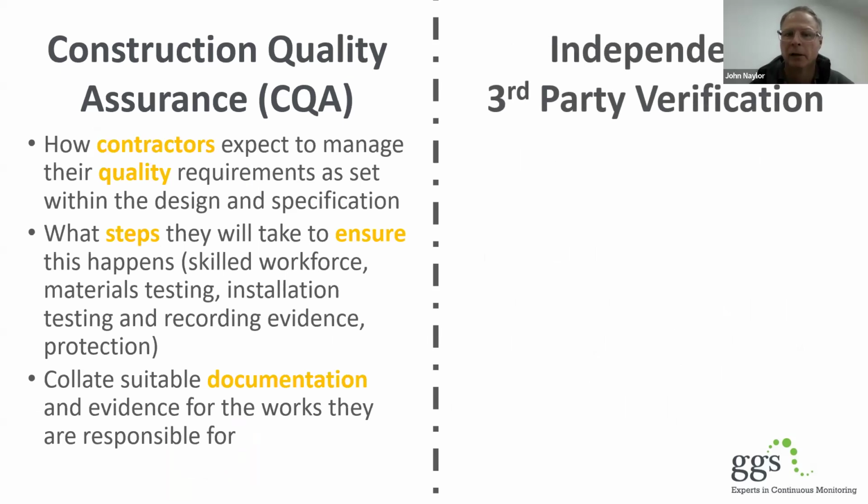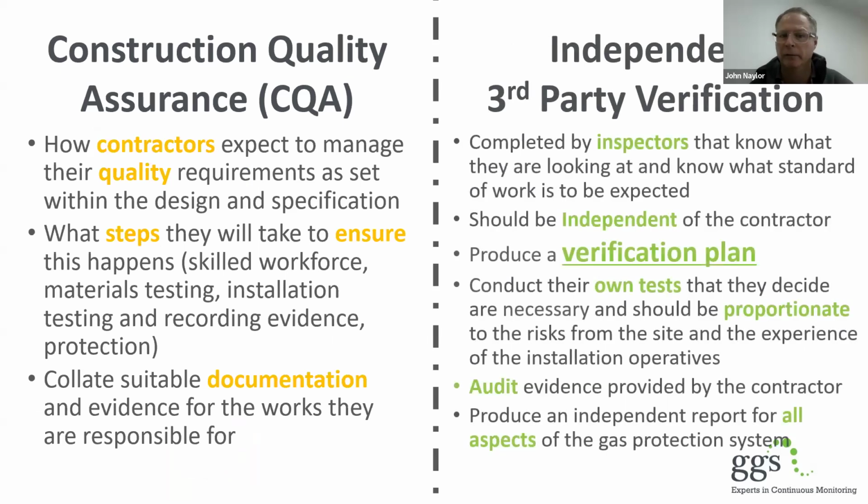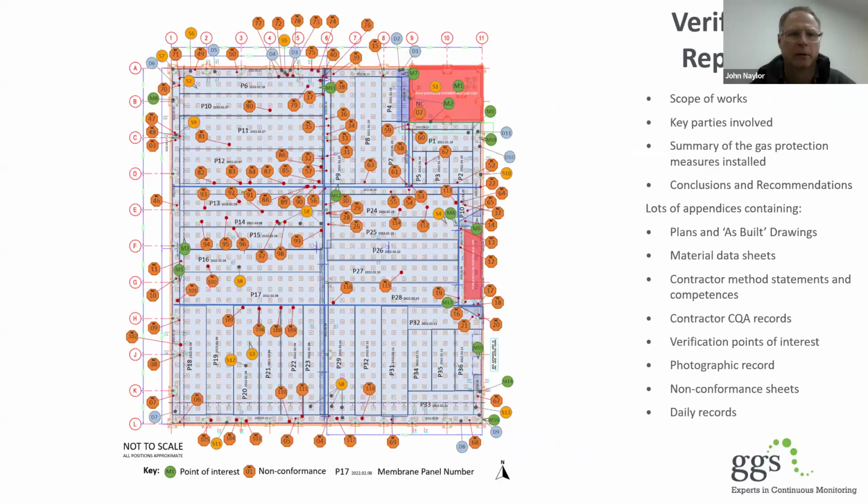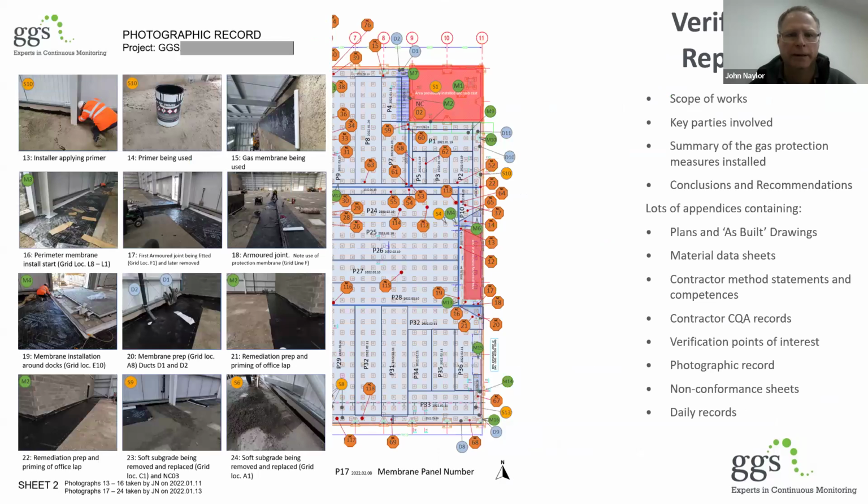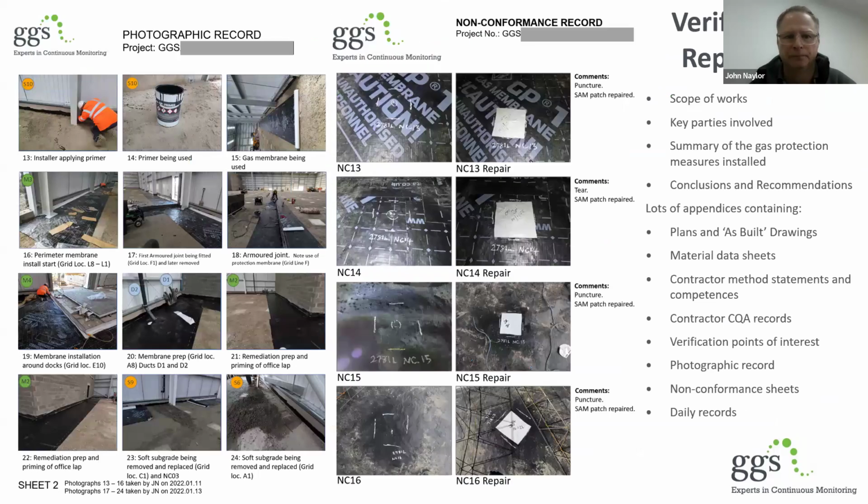Independent verification is something very different. It's done by inspectors that should know what they're talking about. They have a verification plan to create, and they do their own tests proportionate to what's going on. They audit the data and the CQA that comes from other people for all aspects of that gas protection system. And again, what does that look like in the report? Something like this. So there we've got the plan laying out what's going on, and then the data that goes in after it.